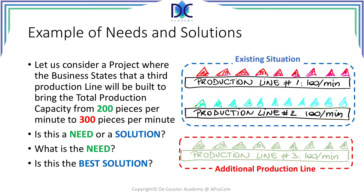The first solution would be to increase the capacity of the existing production lines. In certain cases, we can increase that capacity to 150 units per minute, which would also give us the 50% increase and a total capacity of 300 units per minute. A second alternative solution would be to outsource that additional production capacity to another company. Now let's quickly review the different possible solutions and some of the pros and cons of them. The first solution was to build a third production line. Building a production line is not cheap, it takes time, and we need additional space.